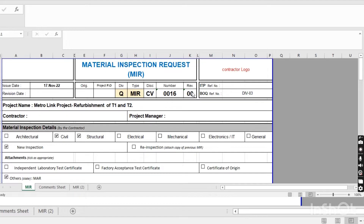If you are going to submit a revision — for example if the first was rejected with code CR — you have to write revision one, two, three, and so on. Here you have to write the ITP reference number for the activity, because when you are bringing the material for any activity, you have to make an ITP for that activity. And here you have to write the BOQ reference number from the BQ.